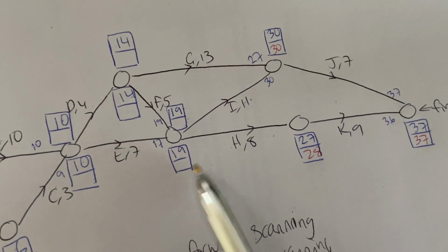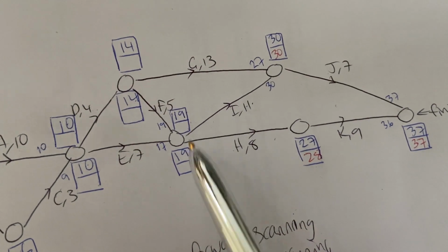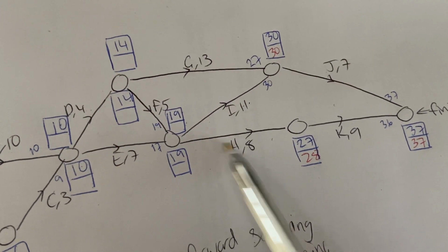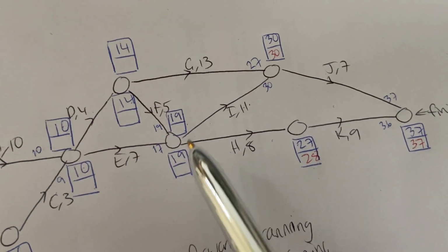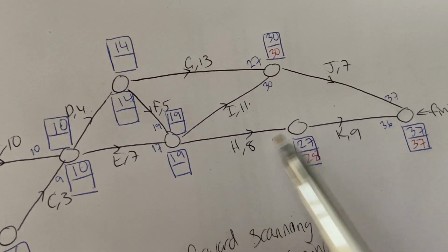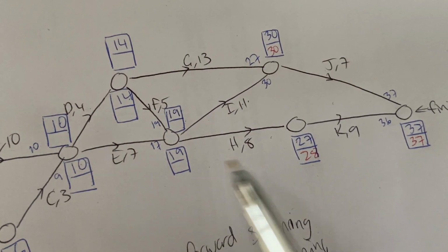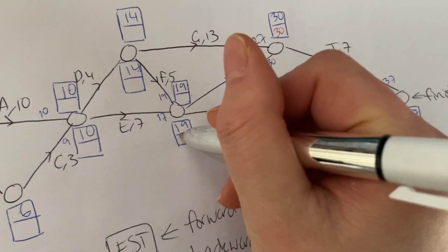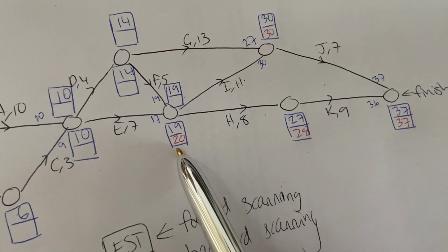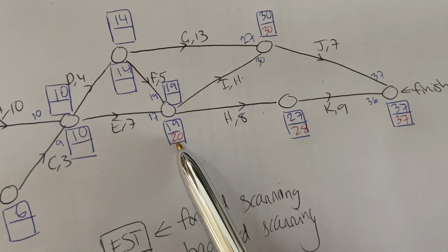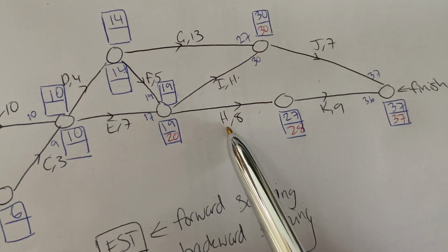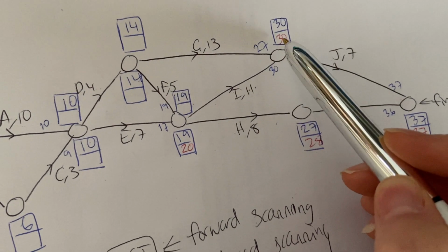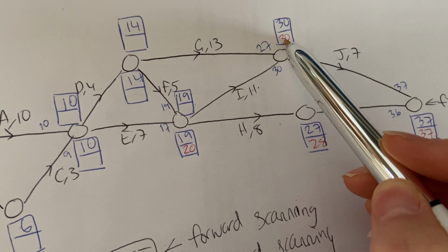So we're going to work out this one here. Remember, I didn't label them, so I'm just going to call the top ones I and this one's H. But if you swap them around, then you should really label them. It just makes life easier. So I'm going to look at the bottom one first. 28 minus 8 goes to this bottom bit. So that's the latest start time for H.